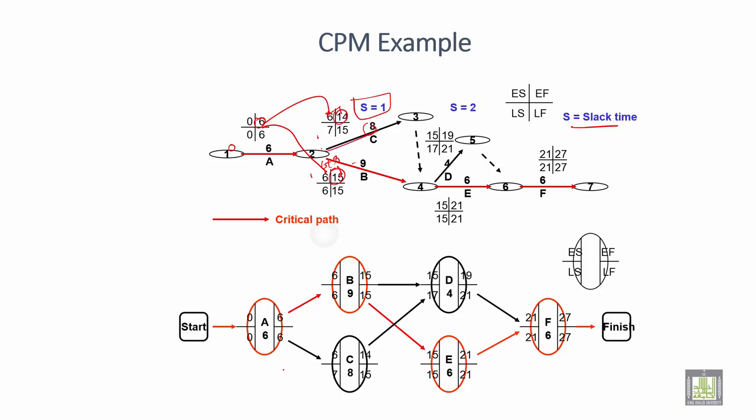This is 15 and this is 14. This is a critical path. When there are two paths, it reaches here with a slack of 2. What you have to do is choose the biggest. 14 is there, 15 is there. Choose the bigger one, 15. Then 15 plus 4 is 19. Similarly, again you choose 15 because it is the largest. Again, 15 plus 6, so you have 21.